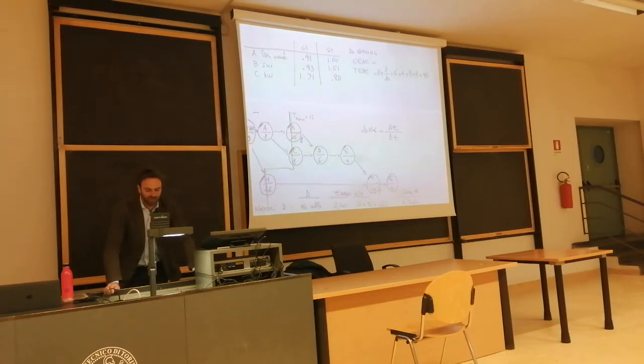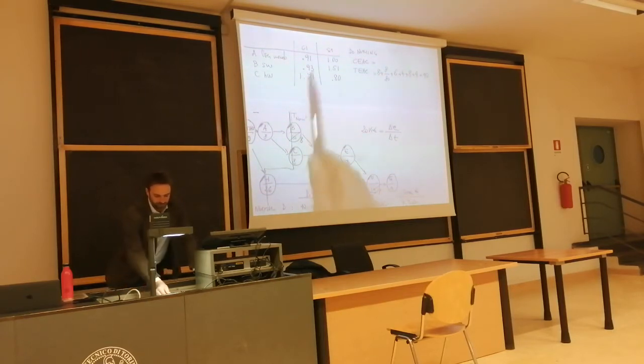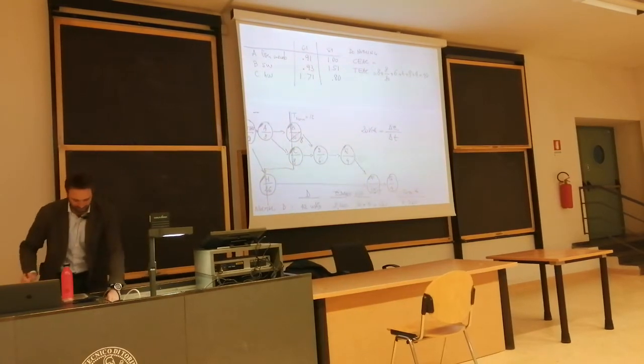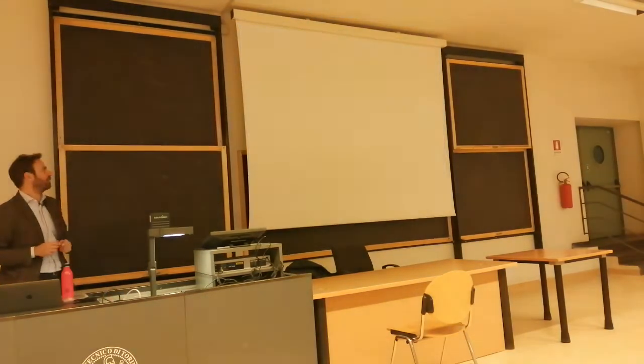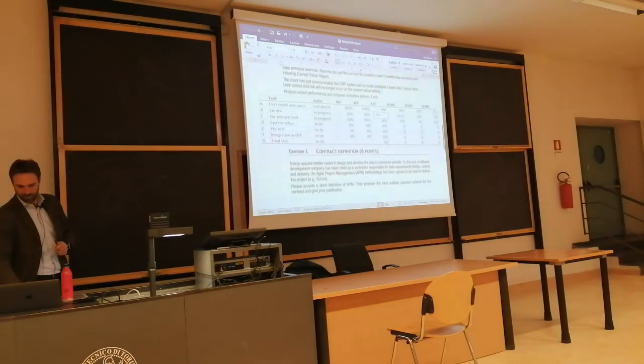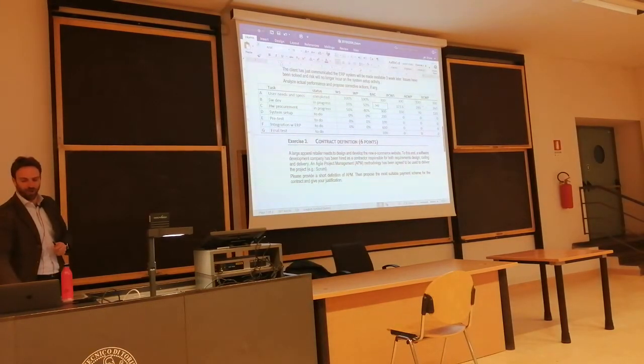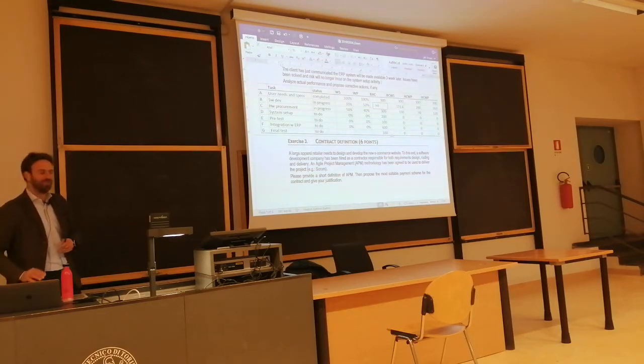How much is the cost estimate at completion? A is experienced as 0.91, so I can go back to the computer here just to show you how much was the cost incurred. Let's go line by line to cost estimates. 330 was the cost incurred for A, which is done, plus 540 divided by the cost index plus 300 divided by the cost index plus future.